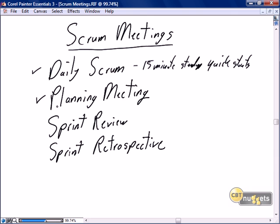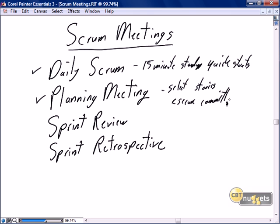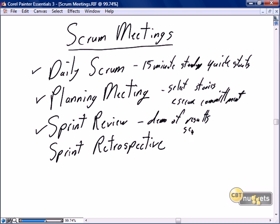Prior to the initiation of a sprint, there is a sprint planning meeting where you select the stories to be completed in the sprint and you secure commitment that the team believes they can accomplish and complete all of those stories within the sprint. At the end of each sprint, we do a sprint review where we do a demo of the results and we secure acceptance that the stories are done.